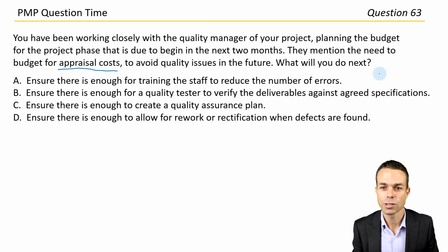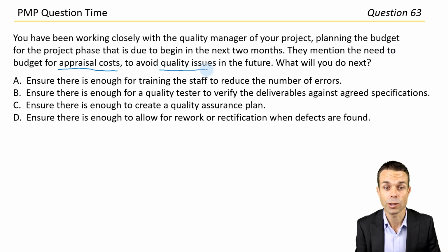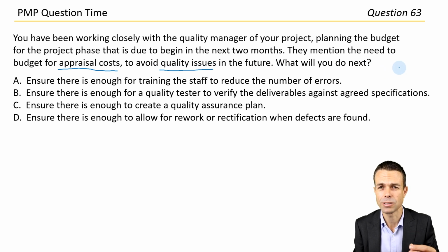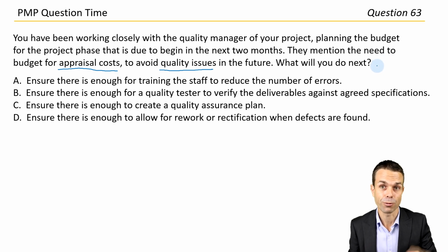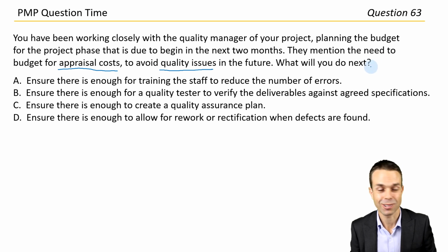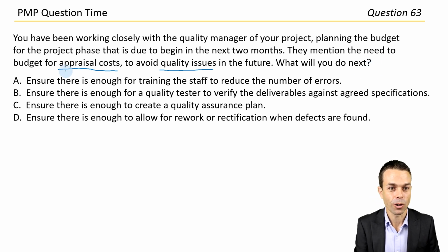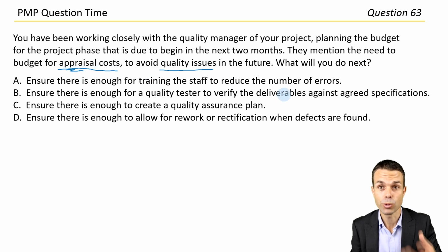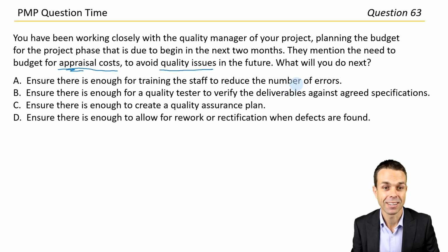Okay, the cost of appraisal, there's different types of costs. Cost of prevention for quality. So the cost of quality: prevention costs, appraisal costs, and there's failure costs if we catch a defect, internal and external. So if we catch a defect before it reaches the customer, it's internal. If it reaches the customer and it's a failure in the quality, then that's external failure costs. The worst kind and the most costly as well. So appraisal costs, we're appraising, we're reviewing, we're checking. This is our testing phase.